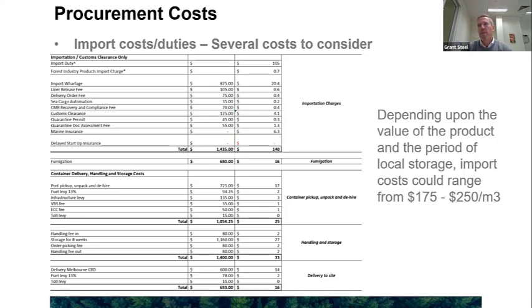You've got your customs clearances and fumigations, which are the extra 20%, and then the final handling by the third-party operator, the storage, and delivery to site is probably the last 30%. As a rule of thumb, just to give a value to that, it's around $175 to $250 per cubic meter that you should be allowing for the actual domestic care for the product.